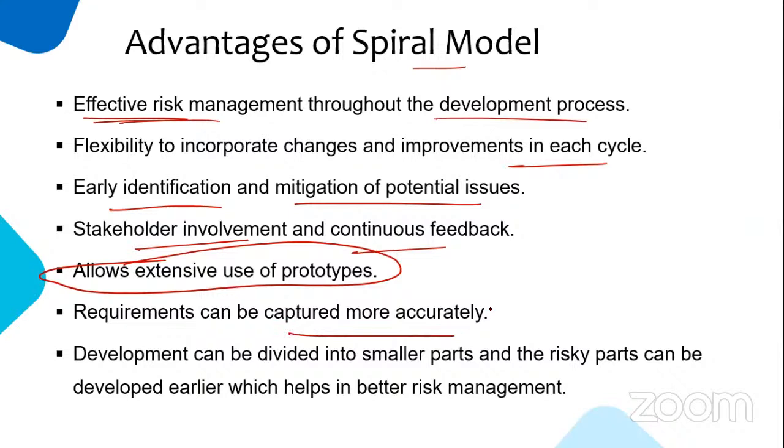They give more focus based on the risk, which means the requirement analysis will definitely be in depth. Most of the defense projects will fall under the spiral model. And of course, product-based companies, for a particular product, will follow this spiral model. The problem with this is that sometimes it will end up in an infinite loop, which means you cannot complete the project. Sometimes it will go in the wrong direction if not properly managed.